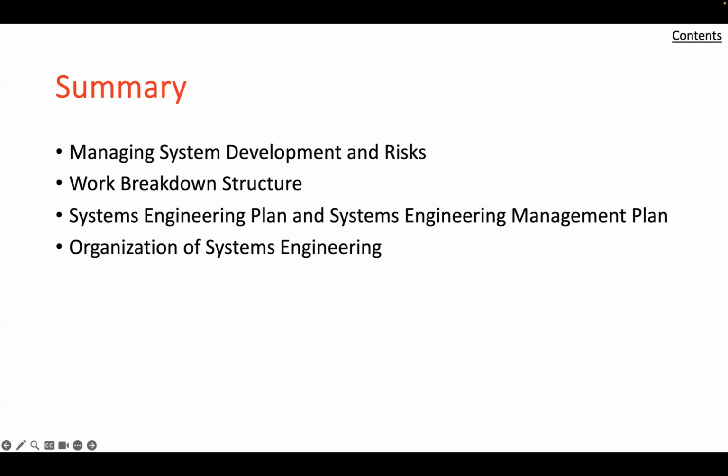The system engineering role also involves contributing to resource allocation, task definition, and customer interactions, with the initial focus on the development of the WBS, a hierarchical task organization that subdivides total effort into subsequently smaller work elements. This provides a basis for scheduling, cost monitoring, and enables cost control and estimating.